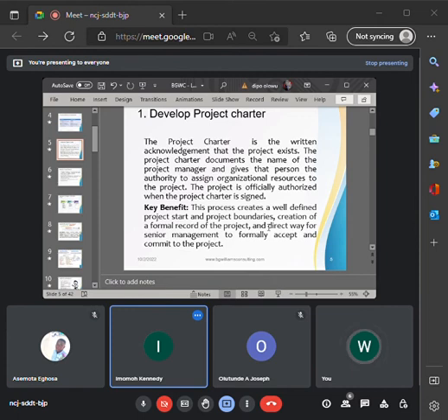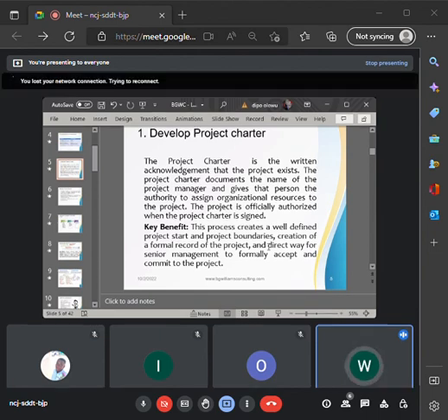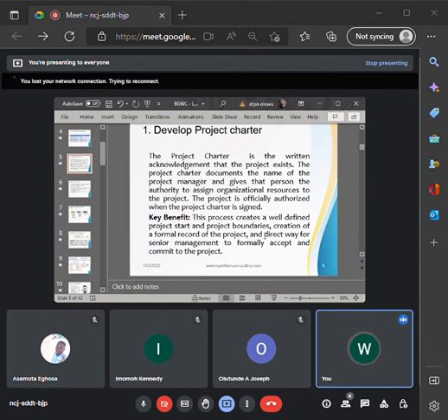Okay, all right. Thank you for that question. In that case that you just cited, a project is ongoing already. Remember, being ongoing simply means a project charter has been created and signed, which means money has been spent already as the project is ongoing. So in that case, it is not the project charter document that is changed if there is a delay. The document that will be adjusted will become the schedule document.